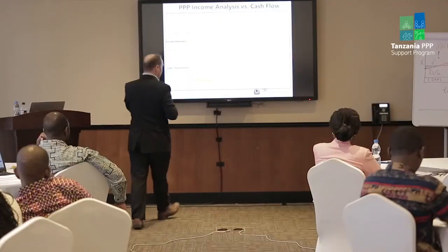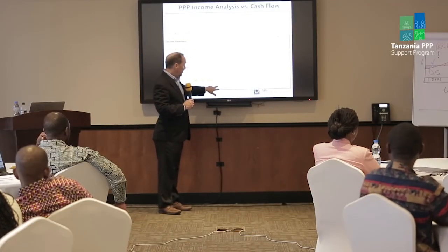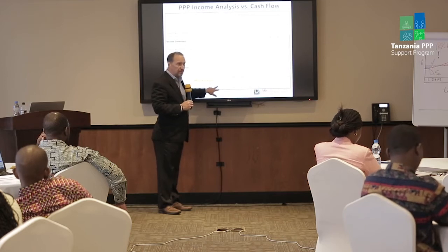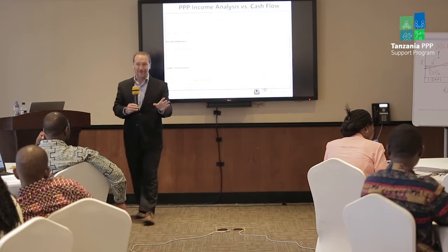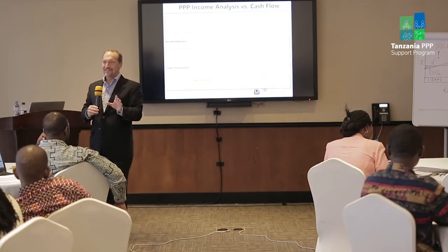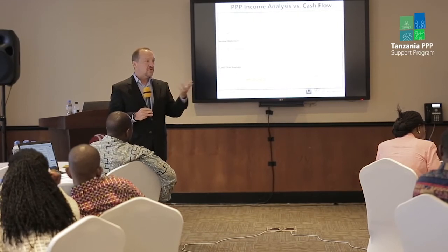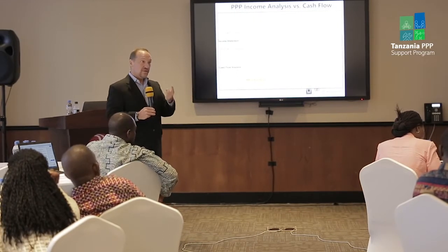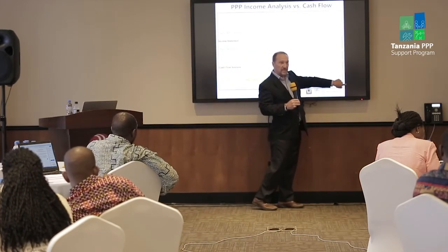Our debt service, this line comes here, 14.1 million. That is total principal and interest. There's even a PMT formula in Excel. PMT is basically just compute total debt service. And it's really nice because it's the same for every year of the life of the loan, right?